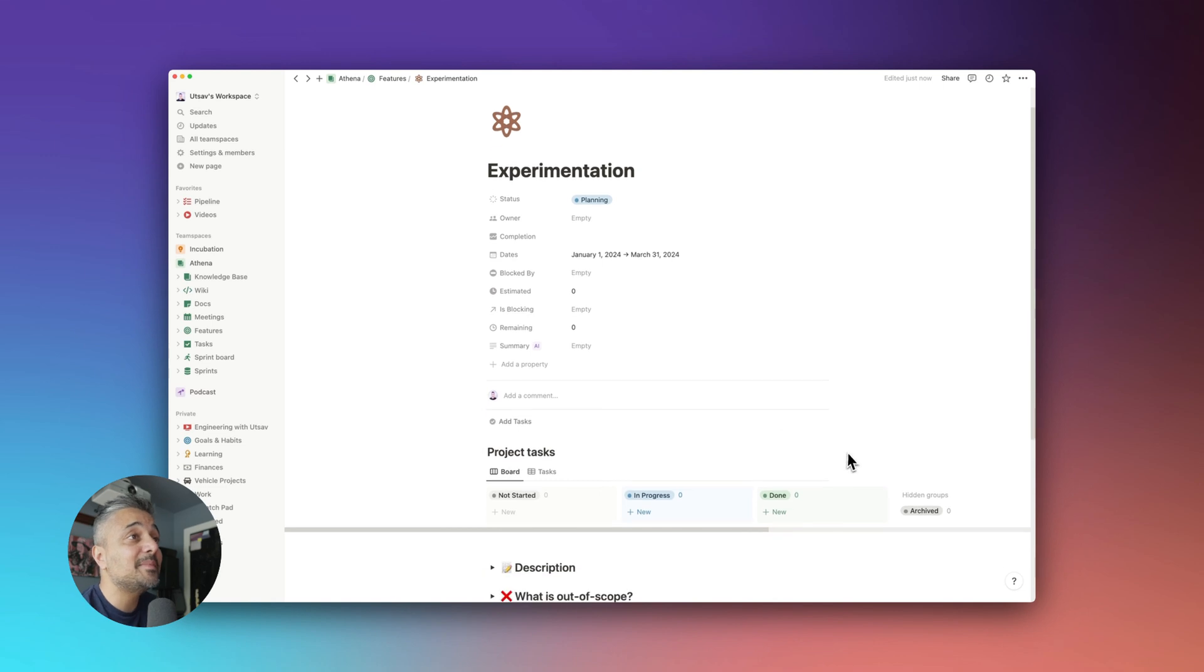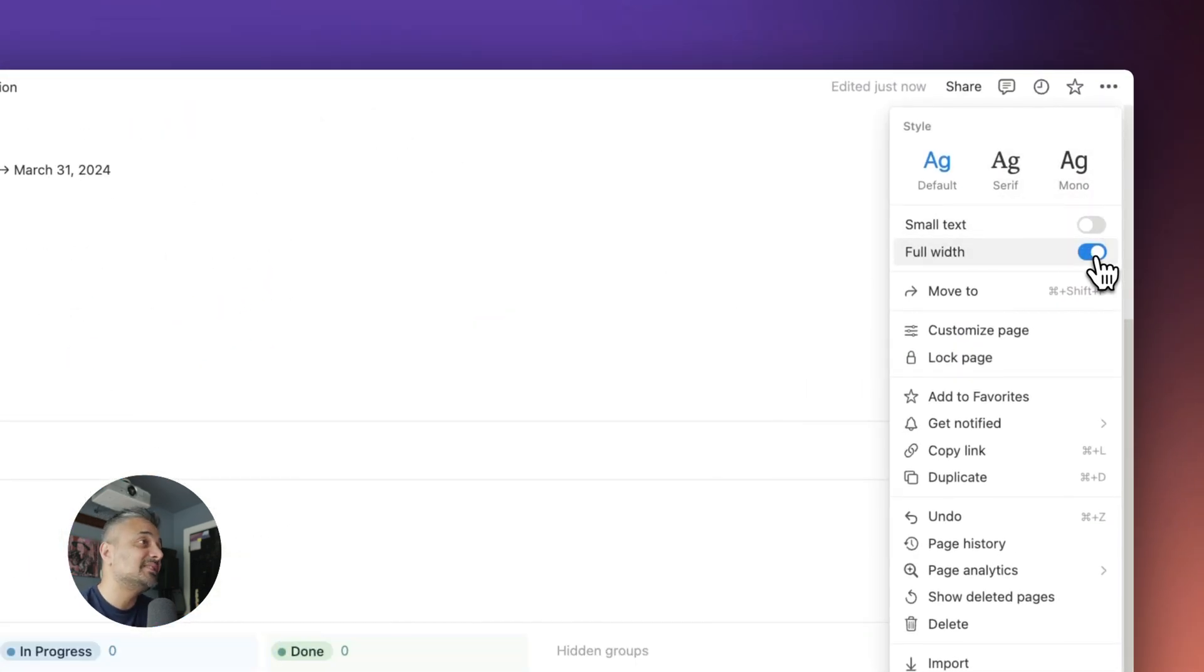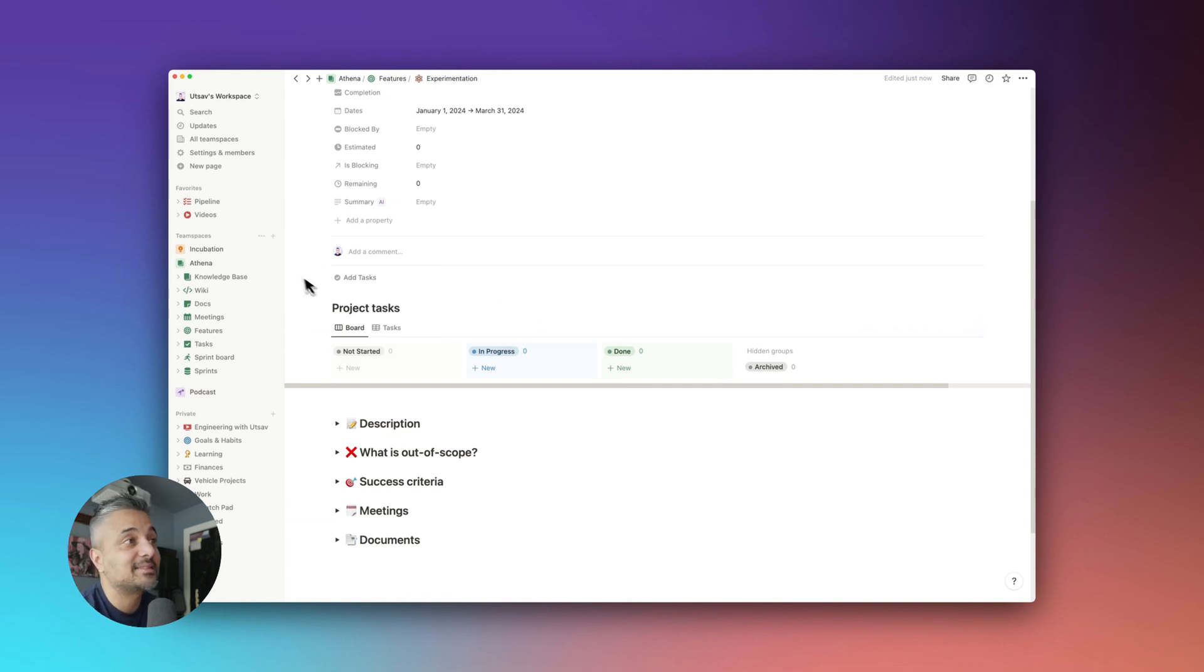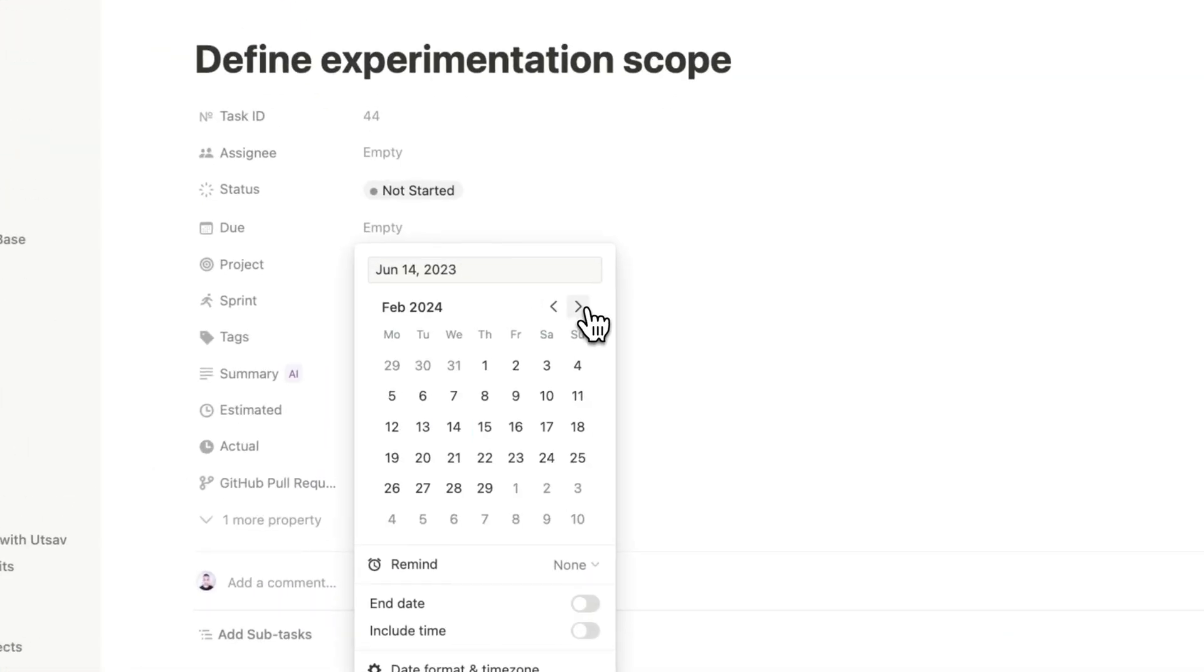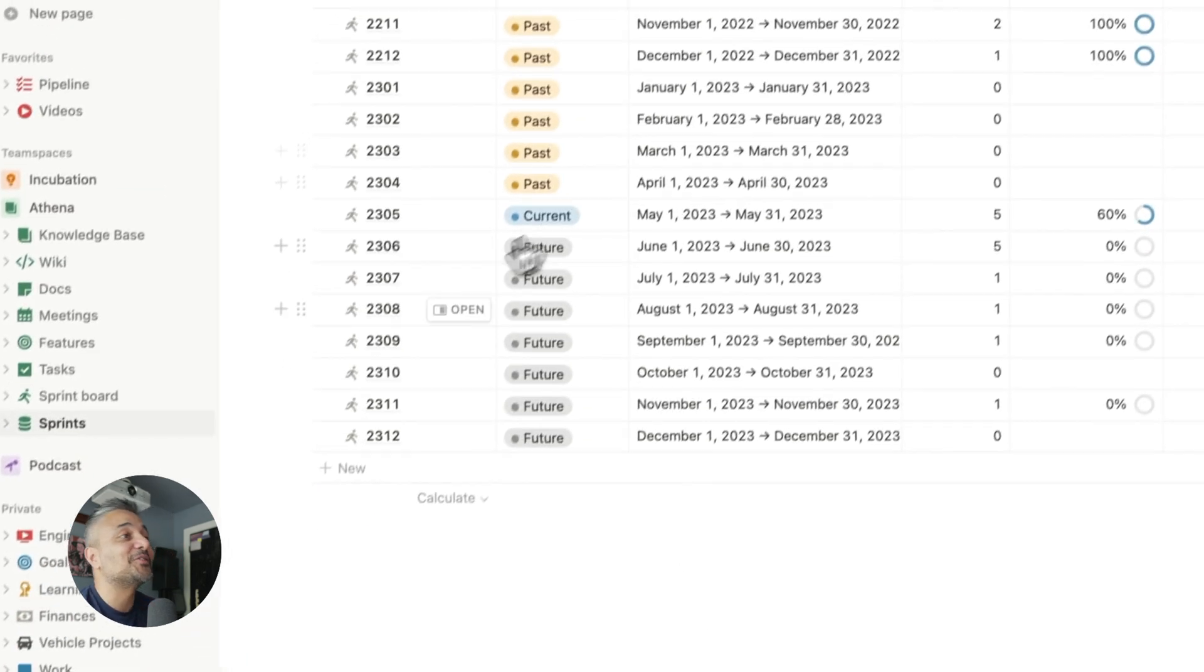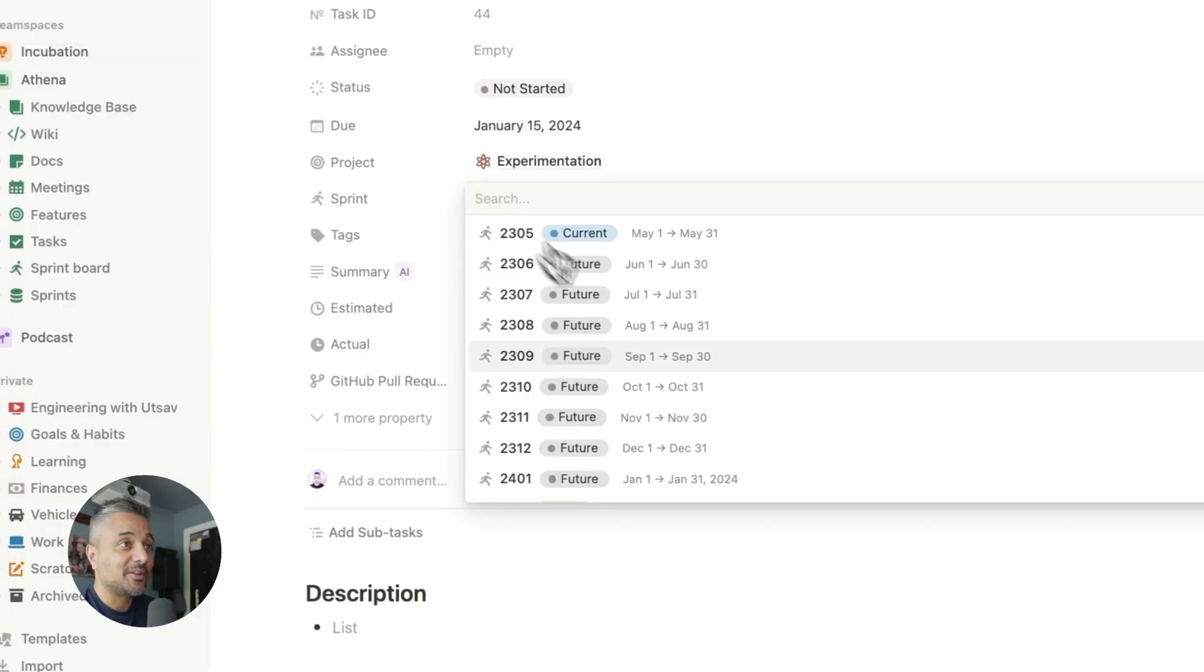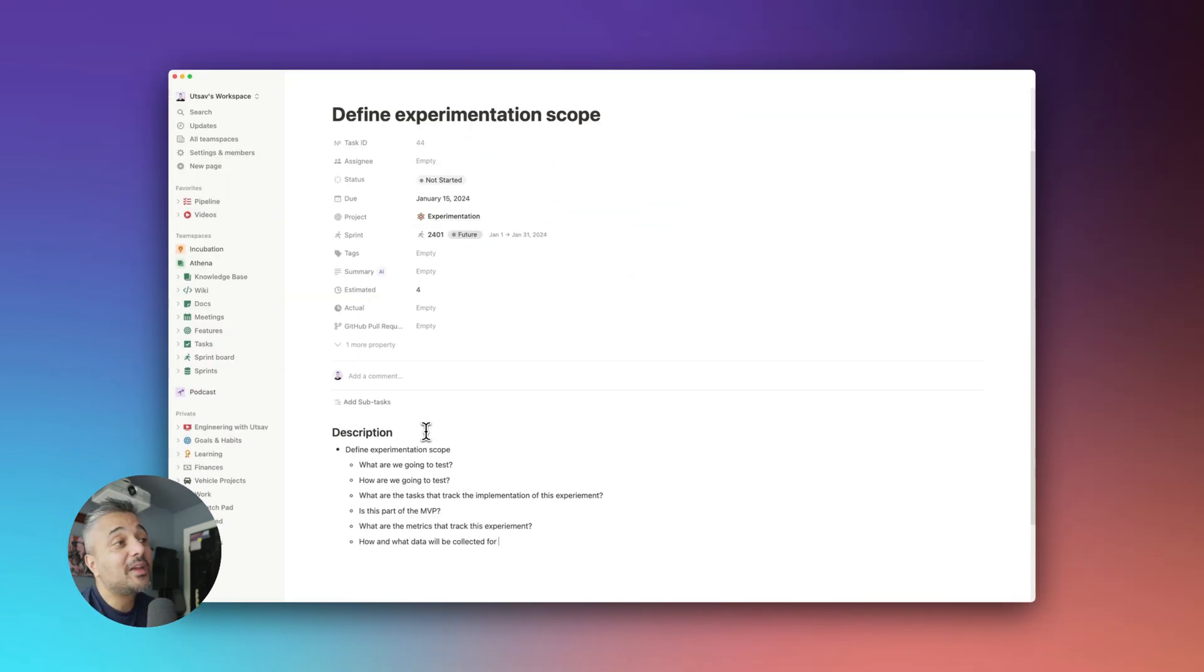Some of this stuff is automatically added by Notion, like status, owner, completion, etc. But you can easily add any of this by yourself or customize it to a more detailed view. If you see, it automatically also lists a Kanban board for the tasks. The stuff below the board is something I've created as a template. So when you create a template, you can automate the format and even some actions like creating tasks automatically. Let me add a task here. Let's call it define experimentation scope and set a due date of January 15, 2024. I also want to set the sprint to January 2024, but it looks like we don't have that sprint created yet. My sprints are only as far as end of 2023. So let's quickly add the new sprint. Okay, so now that we can select that sprint, let's go ahead and do that. And let's say that the task will take around four days. Okay, so now I can quickly add the description of what the task is about. Okay, and I also added a few common questions around experiments.